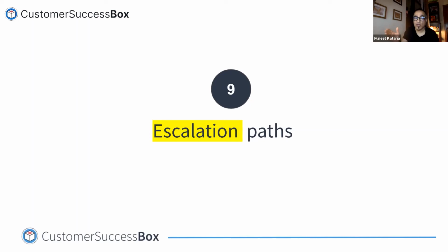Let's say you're working with a particular function within the organization, you should know that after 2 days or 3 days of slippage, you are going to escalate that internally to whoever their manager is. And that escalation path and those internal SLAs should be predefined, known to everybody, including your colleagues, so that there are no surprises. You don't want to be in a position where you are complaining or backbiting about your colleagues. I'm not recommending that. But having very clear expectations from each other in a very professional manner is a bare necessity.